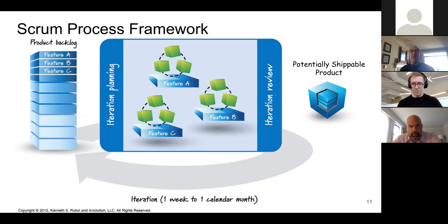So we observe that, we show it to ourselves, our colleagues, our stakeholders, and our customers in a meeting called the Sprint Review. And then we also take the time, as prescribed, again, in the Agile principles from yesterday, for the team to review its own work by itself, right? It introspects and does a retrospective to try to find a way to work a little better during the next sprint. So this is a way to ratchet up the team's performance over time and get better and better and better. One of the many places where we get improvements in productivity in Scrum.